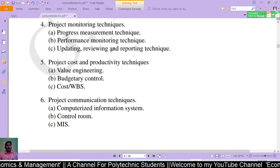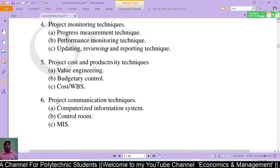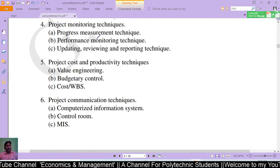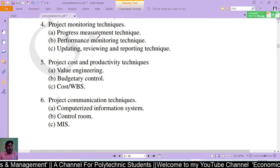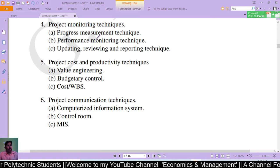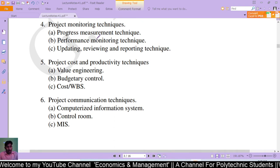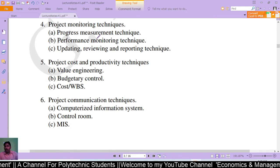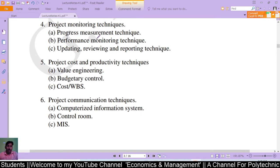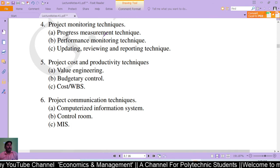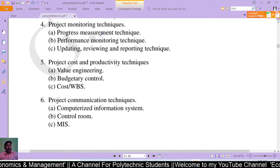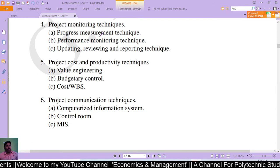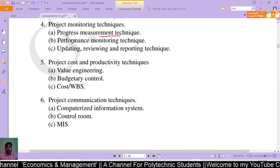The fourth category is project monitoring techniques, which includes progress measurement technique, performance monitoring technique, and updating, reviewing, and reporting techniques. Progress measurement is based on various techniques including milestones, weighted steps, value of work done, physical percentage completed, earned value, level of efforts, and earned as planned — all used to report and measure how much work has been completed.